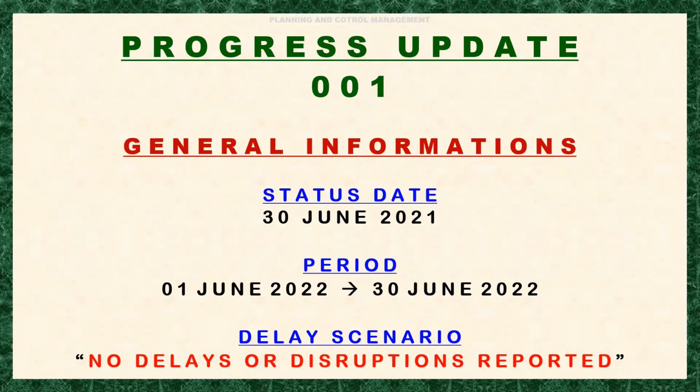Okay, the first step we need to do here is to provide the project teams with the formats for site performance report, and the other one is site resource and expenses report. That is in monthly interval, as we assume the agreement that the reports will be in the monthly interval. It shall reflect the activity progress and actuals of resource and expenses, and report back the same.